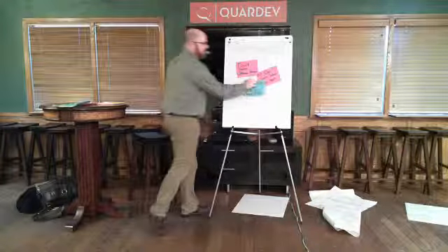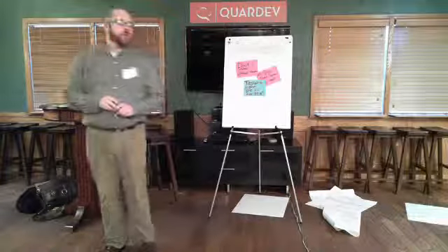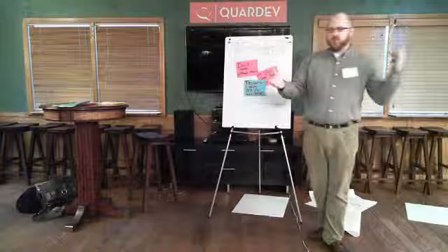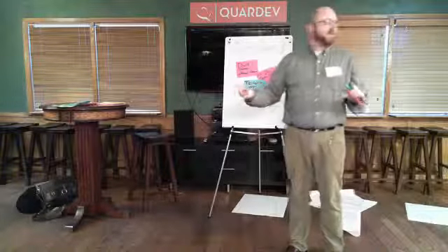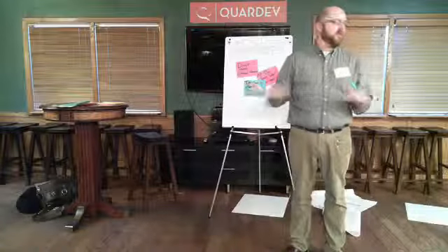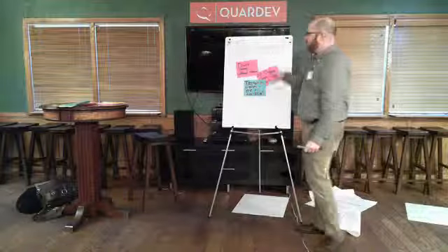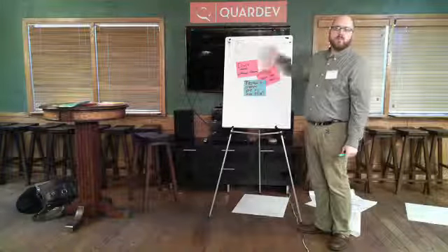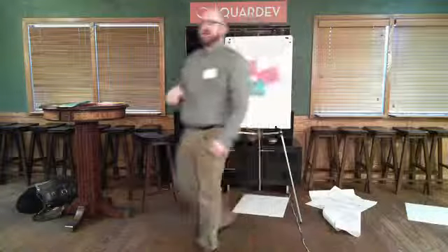Another way to say that is to build it in testable pieces. So if you have a problem in your sprint, where, in a Scrum model, the first 2 weeks are all programming and nothing is testable until the very end, and then it's crunch time for the QA part of the team, or everybody goes over to quality assurance, that problem is addressed by driving your development work with testing. And I'm going to expand on this in the next slide.